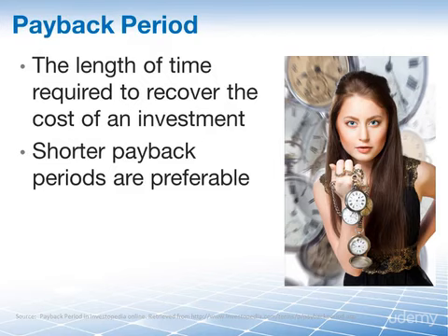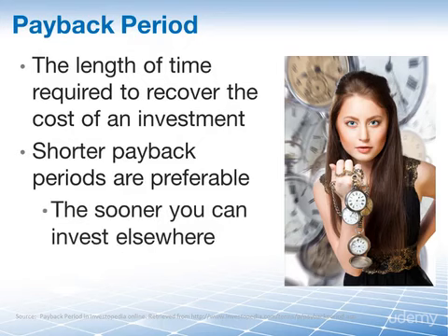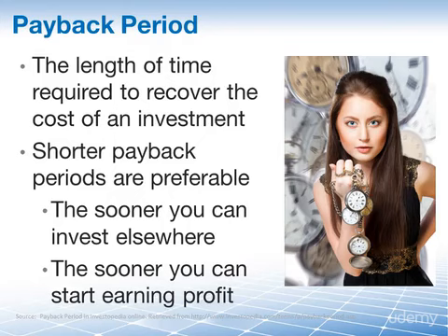I know you may be getting tired of hearing it, but I have to say, as long as everything else, risks and all the other factors, are equal, then the sooner you have your original investment back, the sooner you can opt to invest into something else and get a return. And the sooner your original investment can start earning profit for you. So for the exam, what you need to remember is that when you are comparing the payback periods of two equal projects, then a payback period of 6 months is better than a payback period of 12 months.